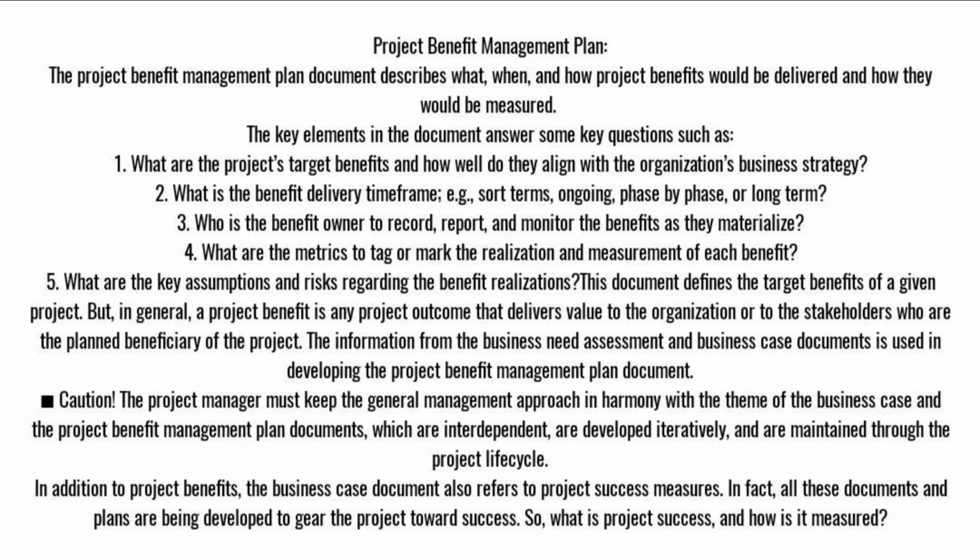Project benefit management plan. The project benefit management plan document describes what, when, and how project benefits would be delivered and how they would be measured. The key elements in the document answer some key questions such as: 1. What are the project's target benefits and how well do they align with the organization's business strategy? 2. What is the benefit delivery timeframe, for example, short term, ongoing, phase by phase, or long term?